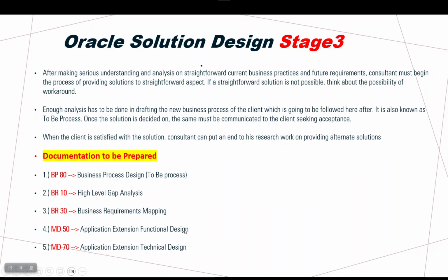PR100 is the high level gap analysis. Gap means what? In some cases my current business is not covered in Oracle, as I told you, not as a standard or workaround. So the gaps will happen in these cases. For example, I need assets to create an invoice by microphone. Sorry, this solution is not provided in Oracle, either as a standard or workaround. So in this case, you will find some gap between the organization or client requirement and the software, which here is Oracle. So you have to develop a high level gap analysis: the client needs 1, 2, 3, but in Oracle it's only 4, 5, 7, for example.